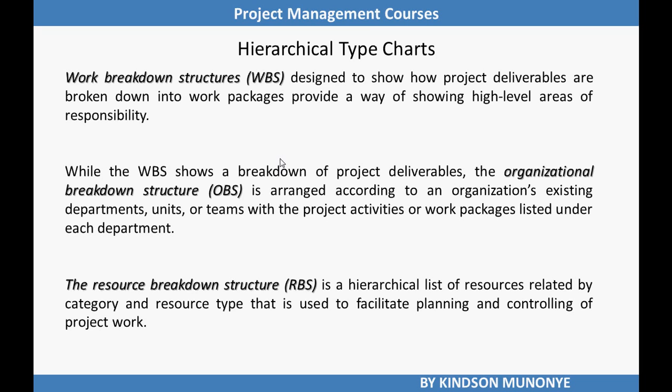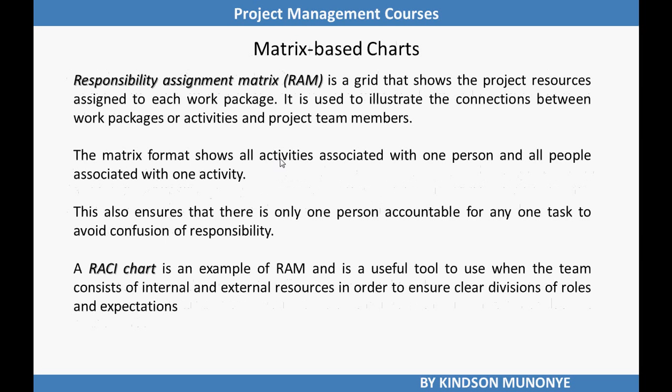Alright, let's now look at the matrix type organizational chart. Of the matrix-based charts, one of the most important is the responsibility assignment matrix. Responsibility assignment matrix is a grid that shows the project resources assigned to each work package.